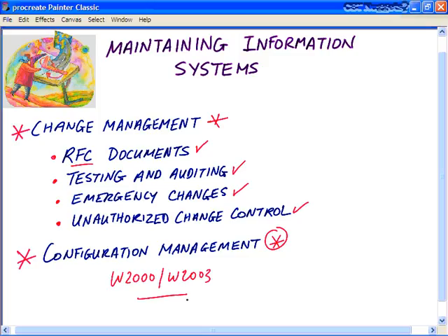You need to be able to identify, define, and baseline the software items in the system and provide a basis for any problem management or change management, and releases of new software updates. Configuration management is crucial because software is always going to be changing on a regular basis, sometimes on a weekly basis, during and after the development process. You want to identify items that are likely to change on a regular basis, and once identified, hand the information over to your steering group or configuration management team to document the information, assign it a reference number, and put it in a database for future reference. This information can be used to create your change management configuration management baseline.